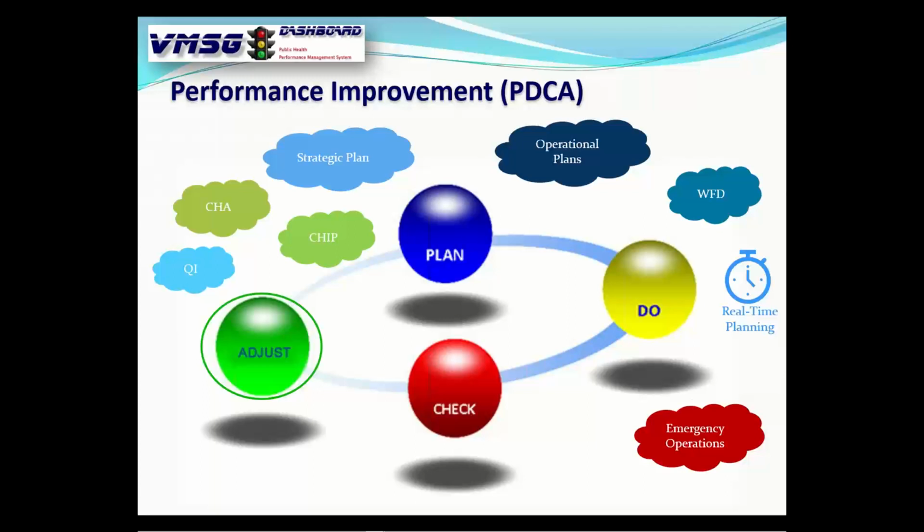And then the fourth scenario is kind of a combination of both. You've got the ability to adjust the plan and the resources. So maybe instead of 25, we take it down to 23, 22 for the plan. And then we go ahead and get the resources adjusted, maybe just doing a virtual training for the students and faculty on the dangers of smoking.